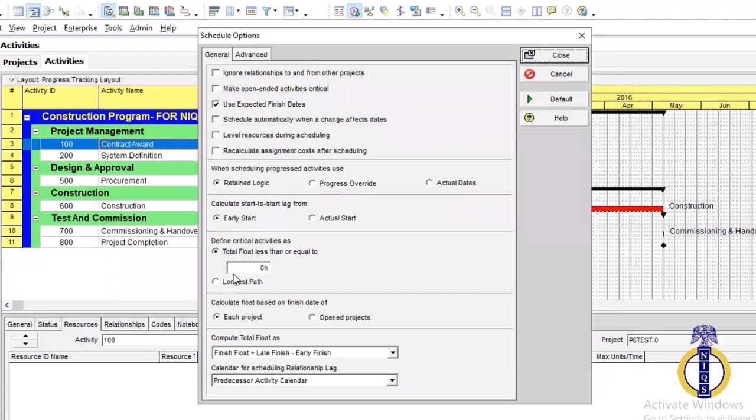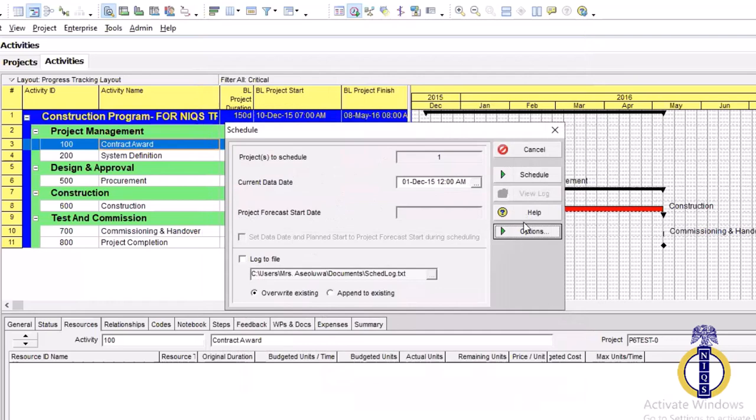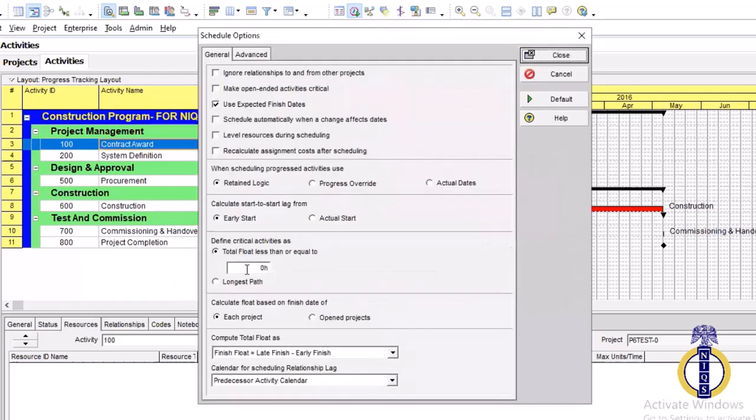There was a project I did in 2014, 72 apartments, NLNG 72 apartments. Akon was the contractor that did that job. And what did I do? I just told them your critical path will be 15 days. Any job that's 3 weeks, I put float of 3 weeks on any job on the critical path. So everybody that sees me printing this will say all of them will be red, because my listing has shown 15 days, right?